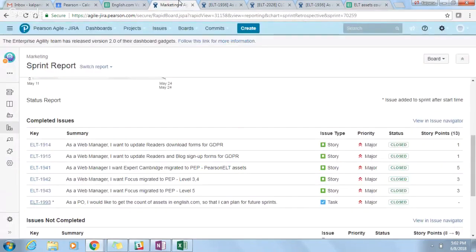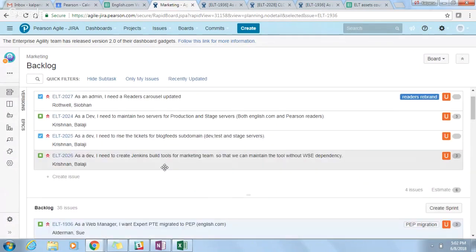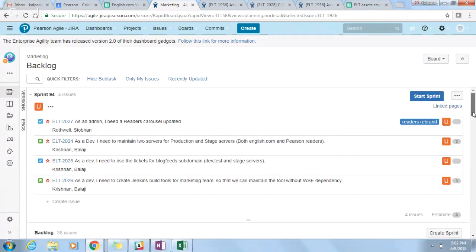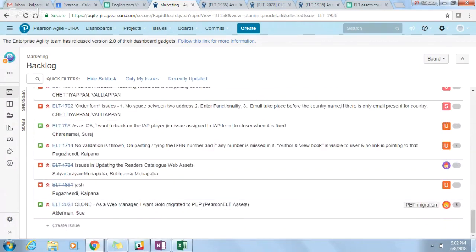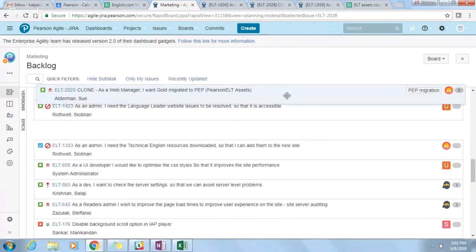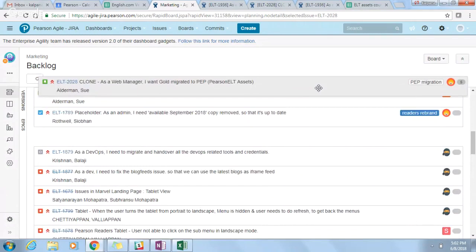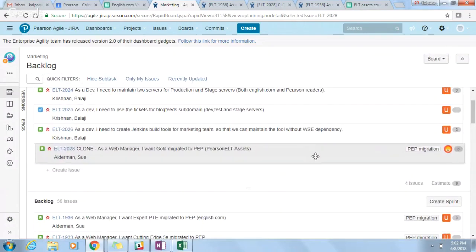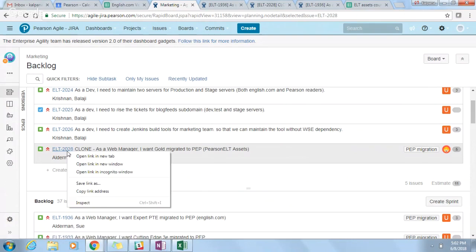Yeah. Because for a sprint we can do a maximum of 500 assets. As we already talked about it, and now we have server related work, so we can take 400 assets. Is that okay, Sue? Taking 400 into the 94th sprint? Yes. Okay. So you can add a separate task for each one and you can split it. Yes. We'll have only one story. 5 points.